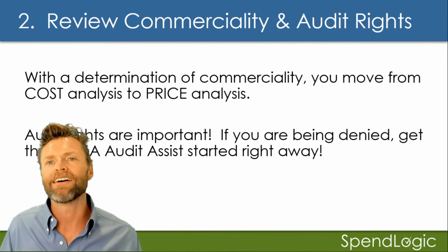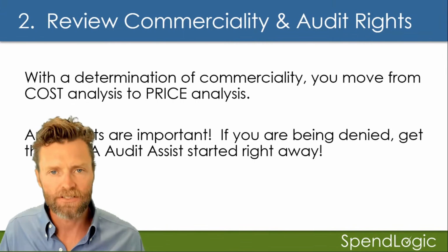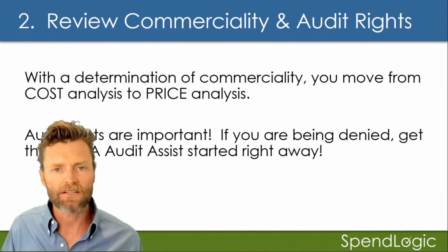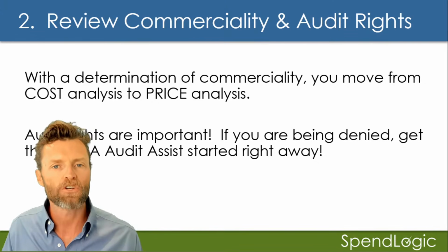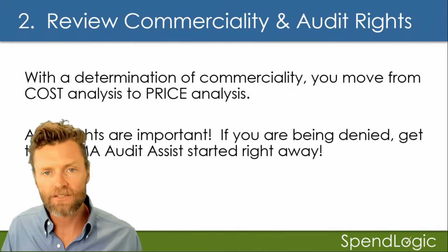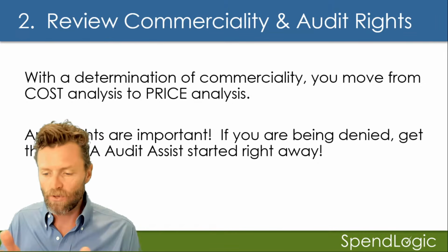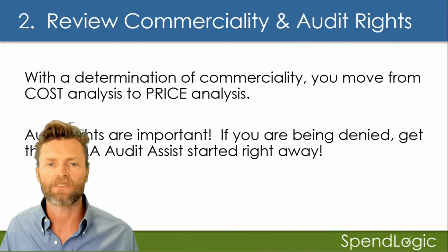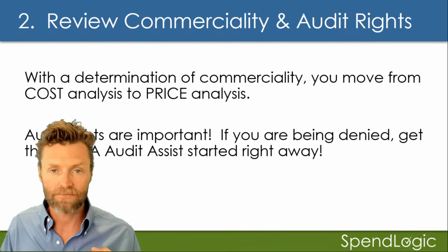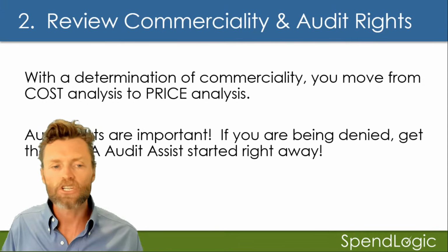It's in your best interest to, even if they haven't asserted commerciality, review the product and understand whether it could be determined commercial or not, okay? Cost analysis takes a lot of time and a lot of expertise. It's actually both at the prime and at the sub. So there's a ton of work that goes into a cost analysis. If you can avoid it for valid reasons, competition and commerciality being the two biggest, then you really should.